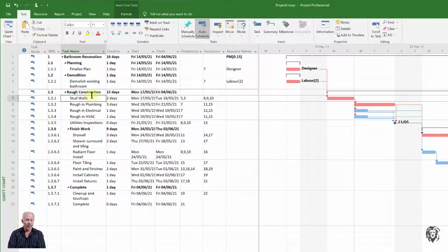So when we chose 1 day, we had it in the back of our mind that we were estimating the time it was going to take to do that task based on the labor pool that we were going to assign to it. We can change all of that and adjust it. But as we move forward, if we're going to adjust it up or down, adding more effort to reduce the time, we're going to have to link those together. So in the first instance, our estimate in time is tied to our estimate in resources. Let's look at some of the other resources. We've added some labor. Let's add some materials to the project.